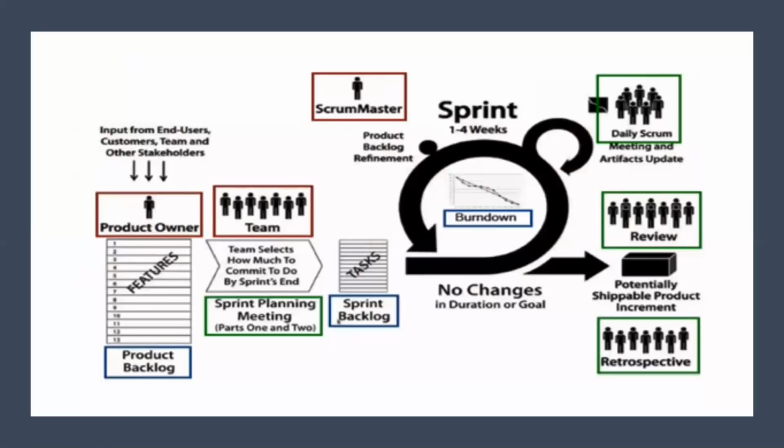It gives the team focus and stability. If something major comes up, the product owner can direct the team to terminate the sprint prematurely and start a new one. That we can do, but it's a rare case. The product owner can add, remove, reorder, or change the items. They can also ask the team to re-implement the work that has already been completed.